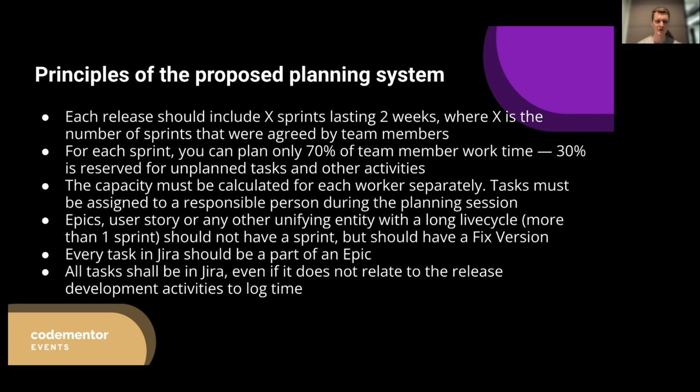Could we do most of our tasks in 1 week? Do you want to cut your sprints to 1 week or not? I believe they will ask you about 2 weeks because this is a common thing. It's 10 working days. It doesn't mean that during these 10 working days, each employee will perform only a single task. That doesn't mean it at all, but it will simplify planning for you very much.